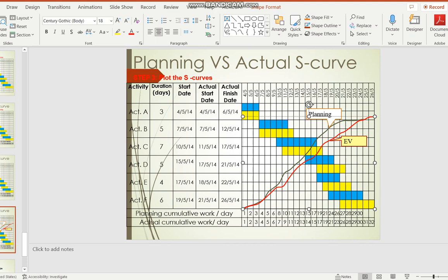The number is EV minus PV, work performed minus work schedule. Once you minus each other off, you will get what we call schedule variances. And schedule variances immediately, straight away, even if you do a tracking gun, you can't really see that particular percentage of delay, see?